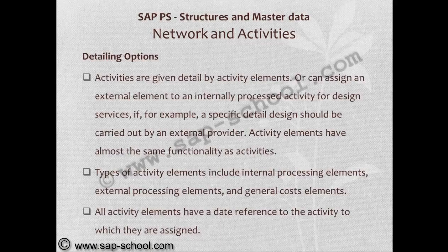Activities are given detail by activity elements, or you can assign an activity element to an internally processed activity for design services. If, for example, a specific detailed design should be carried out by an external provider. Activity elements have almost the same functionality as activities. Types of activity elements include internal processing elements, external processing elements, and general cost elements.